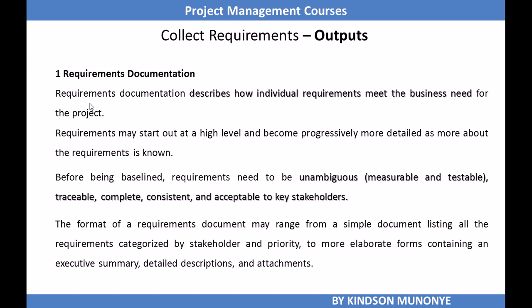Okay, so now let's look at the outputs of the collect requirements process, and one of them is requirements documentation. Requirements documentation describes how individual requirements meet the business need for the project. Requirements may start out at a high level and become progressively more detailed as more about the requirements is known. Before being baselined, requirements need to be unambiguous, traceable, complete, consistent, and acceptable to all key stakeholders.